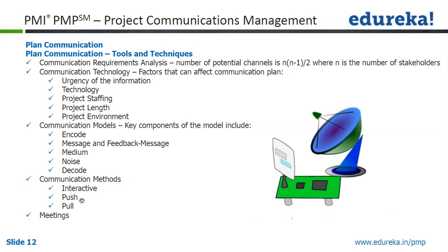That is called the pull method, wherein information is shared on a website. The credentials are given to the users, and they can always access that information as and when it is being published to the various stakeholders.